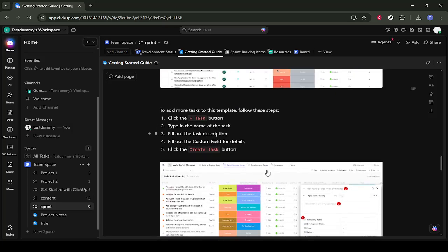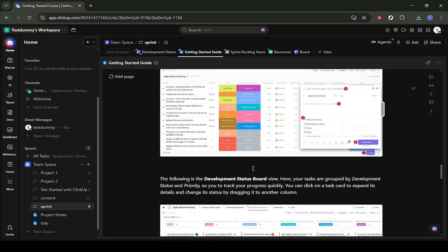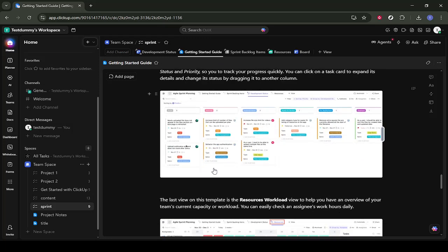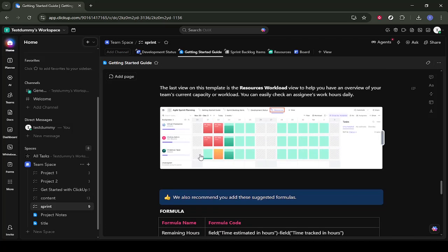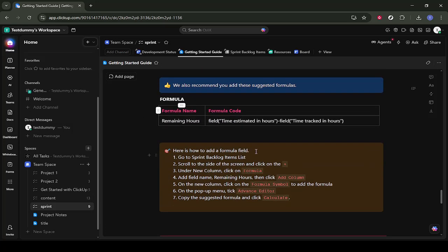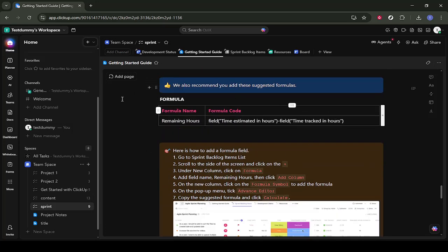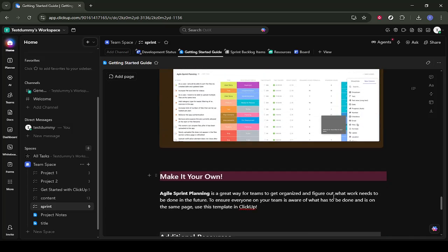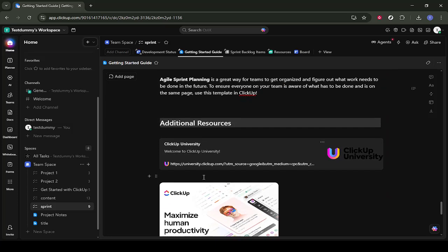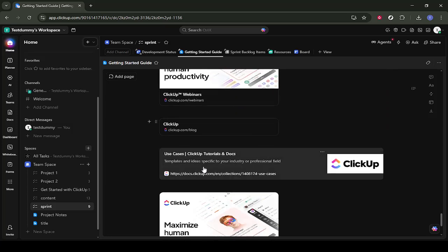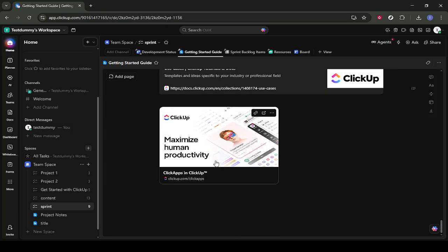As you read through this template, focus on how it helps you set expectations based on your team's capacity. Capacity is essentially how much work your team can handle in a sprint, given their time and availability. Use this moment to think about things like vacation, parallel projects, and historical velocity. The template is there to remind you not just to add tasks, but to plan them in a way that your team can actually deliver.